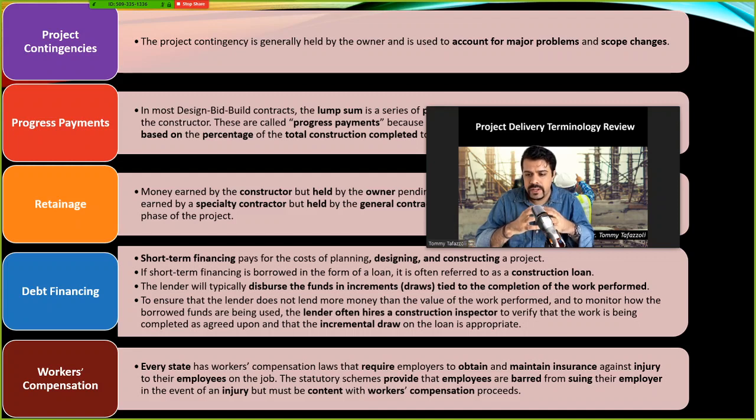So you provide that insurance coverage for your employees, and in return, your employees are barred from suing the employer in the event an injury happens to them. Okay, so you give something and you spend something and you gain something here as the owner or as the employer. Yeah.